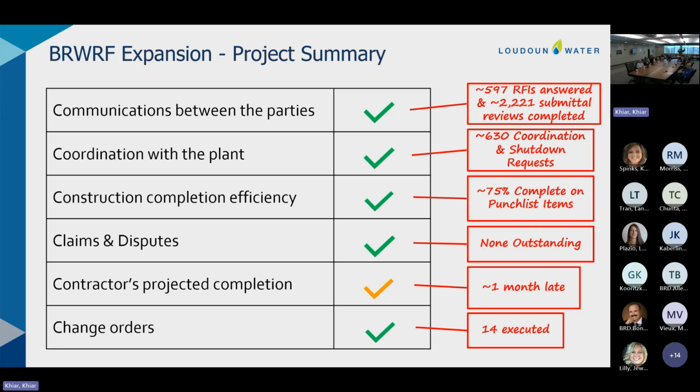Is the delay, or the delays, related to the change order? The delays, so I will add that a couple of claims that we've settled have resulted in some time for them, 21 days to be exact. That is not memorialized in a change order yet, but it has been communicated through claim responses. So they are entitled to some time. But as far as their delays, we're going to have to work through responsibility, whether contractor or owner, and come to a negotiated agreement there.